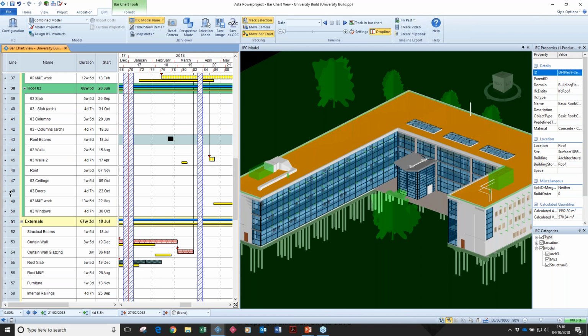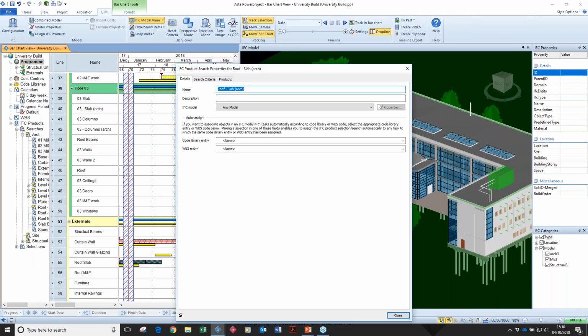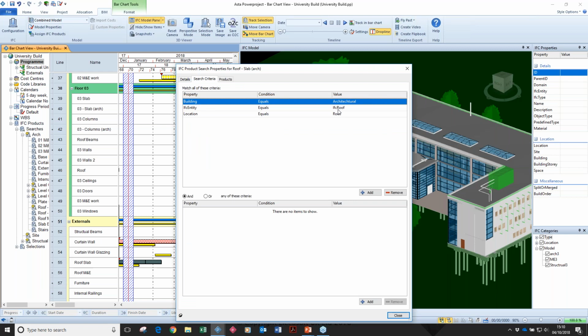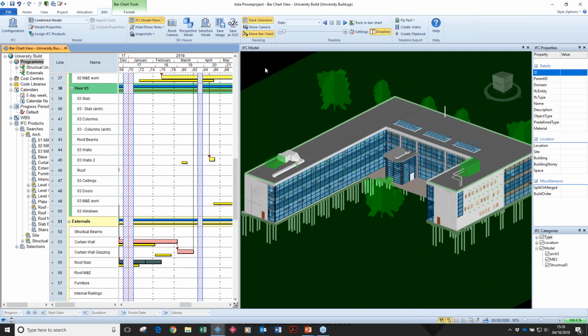So alternatively, we use the searches that were within Powerproject. And if you use a search, and Powerproject is linking to something which has a property name saying search criteria equals roof, that's then down to the actual tagging of the asset, not its unique code. Therefore, when you get sent a new roof, it's got a new code, so it's got a new asset number, but it will effectively still be called a roof, and Powerproject will remember it. So that's another reason why searches are very powerful to link things up, and why we do recommend you use those in as many cases as possible.